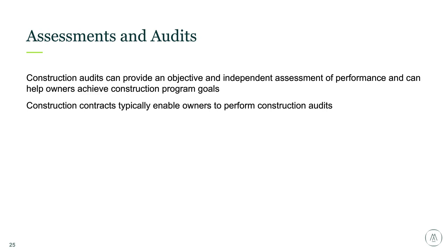For a project specific, we typically will look very early on at what's getting charged, like maybe 5 to 10%, to see what the documentation is being provided to the owner. We often get people scratching their head saying, why would you do it so early? But we've found very strange things, even at 5 or 10%, where maybe the job's only 5 or 10% complete, but they've charged 50% general conditions. So you can assess the control environment, the documentation that's being provided, and identify issues very early on to ensure that you're not overpaying.